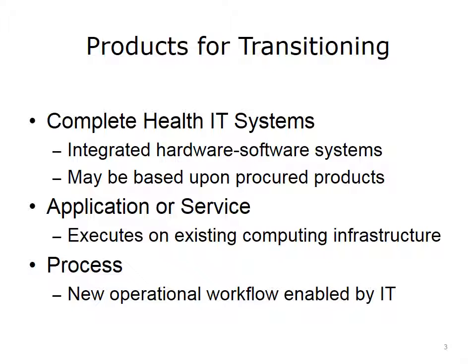Here are some examples of the kinds of products that might arise from your project — the elements we talked about in terms of transitions. There is quite a possible range. It could be complete health IT systems, integrated hardware and software systems planned for use in some operational environment, or an application or service that runs on existing computing infrastructure, or a new process such as a new operational workflow enabled by IT. The transition steps depend on the kind of product being transitioned and the setting the system will be implemented in. Nothing works in a vacuum, and it is important to appreciate both the kind of product you have and the nature of the operational environment.